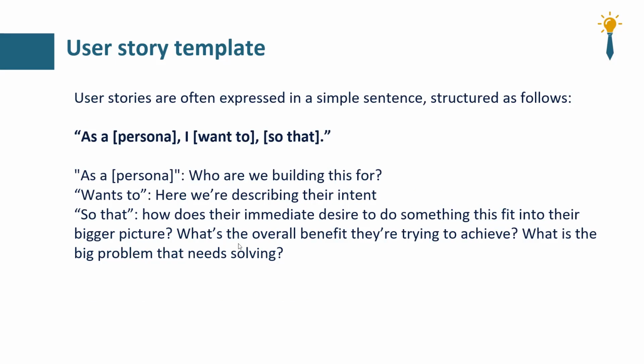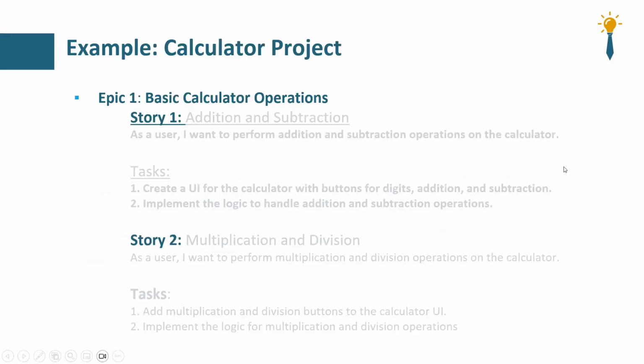For example, as a persona, who are we building this for? These are the users. And they want to do something, which describes the intention, and so that this is the reason and the goals all together. Okay, yes, this is how user stories are built.